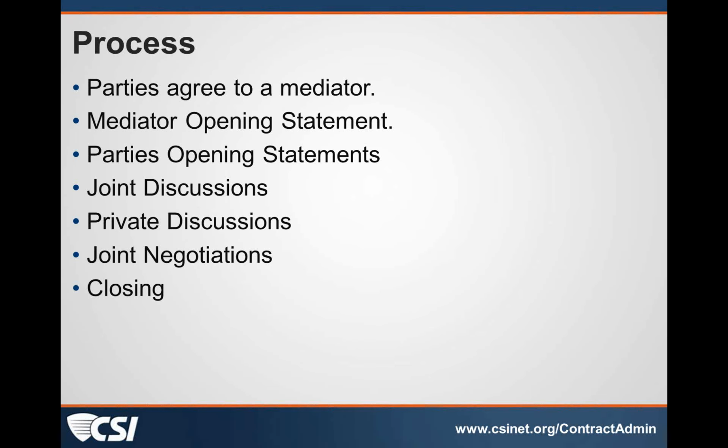So then once the parties identify their mediator and they come to the mediation meeting, the mediator will give an opening statement, kind of explain the ground rules that they're going to be working under, and then each side gets an opportunity to give an opening statement, state their position, state their side of the situation. And then the mediator will facilitate discussions between the 2 parties. He may break up and have private discussions with each of the 2 parties, and then they would come back together and come up with joint negotiations, and then have a closing where either the folks will agree to a resolution or agree that they don't have a resolution.